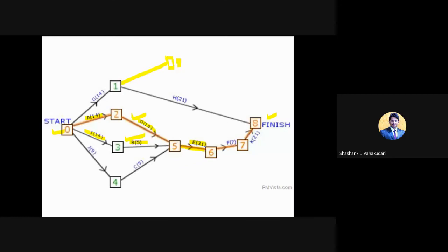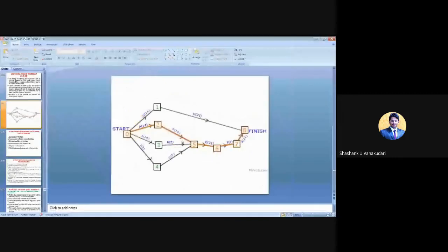So this is not a proper network diagram, because a network diagram should be a closed one. It should have only one start activity and one end activity. That is, it should be within two nodes. So now we need to arrange it properly with the interconnectivity between one activity and the other activity. Okay. And next,